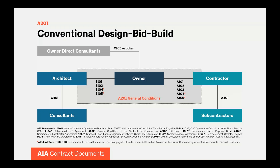Design and construction of complex projects are requiring many more parties, making the project structure more complex. Most of you are already familiar with traditional design-bid-build, where the owner selects the architect first to design the project and produce the construction documents, and then solicits bids to select the contractor. The A201 — the gray rectangle in the middle of the diagram — provides the general conditions that define and coordinate the roles, responsibilities, and relationships between the owner, architect, and contractor.